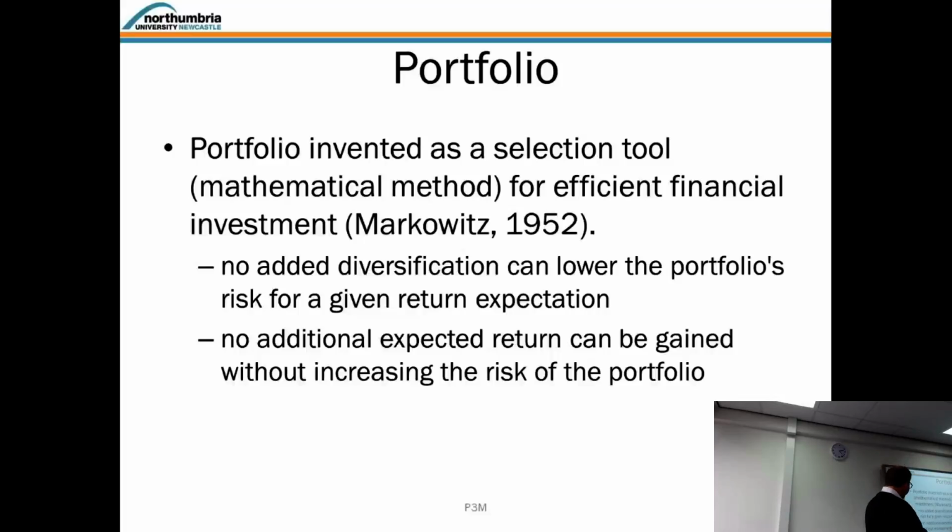So with proportionality, it's a deterministic view of the past, right? We look at our past projects. How many projects did we succeed? How many went wrong? How wrong did they go? Was it a complete failure? So if 1 in 10 goes wrong, then we have a risk of basically 1 in 10, 10%.